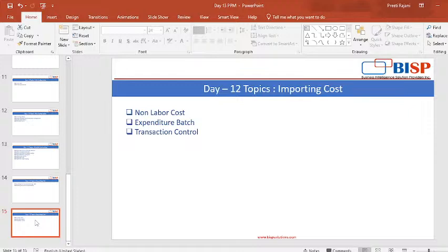do, we will go at project level and we will create the transaction control so that that project can only use the task that is miscellaneous expenses. Other than that, it won't be able to use any expenditure type to create the transaction in the project. Same we can do it on the task level. So we will move to our application to see how we can apply the transaction control.